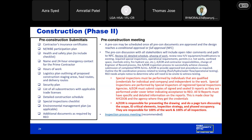There's also a responsibility of how that special inspection report gets populated with information. At times we have to decline or deny these inspection reports because they do not reference a code section. They're missing critical information, or it becomes a photo exercise of work that we do not understand. So those reports really have to be clear, concise, referencing important documentation, referring to shop drawings or details on drawings or a submittal, so that we all are on the same page moving forward,